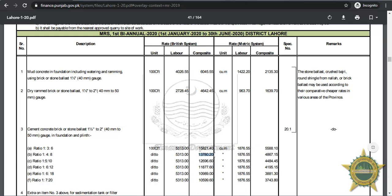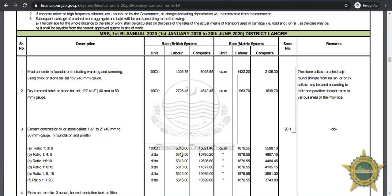The amount of material is shown under the heading of composite charges. For ratio 1:4:8, the composite charge is 13,780 rupees per 100 CFT, which is 137.8 rupees per CFT. If someone is interested in the total labor cost for the whole project, add the labor column for all activities. If someone is interested in total material cost, add the composite column. If you want the total project cost, add both.